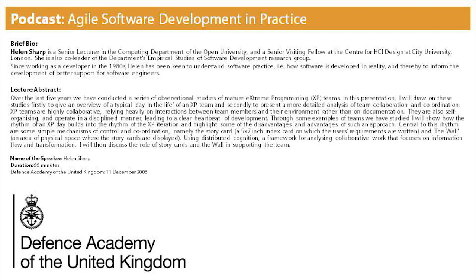But before I go into the detail of it, I have to take a slight sidestep, otherwise you won't understand some of what I'm talking about, and actually mention stories. Have you come across stories? So what is a story? Basically, it's the requirements for the system. Requirements for the system are captured in terms of stories. So it's a description of something a system needs to do. It's a unit of customer visible functionality.